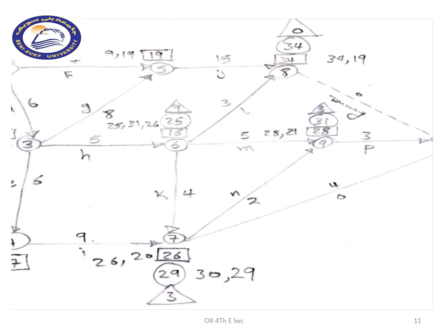When we reach week 29, we shouldn't be later than 29 in order to start activity N and activity O and have the project as a whole done at the end of the 34 weeks without delaying it.